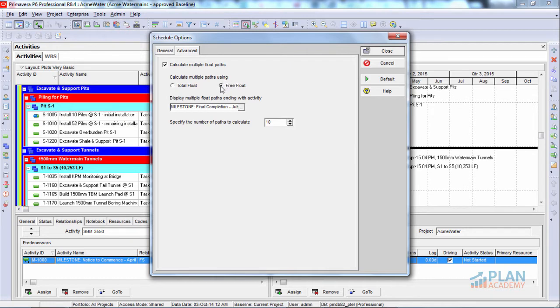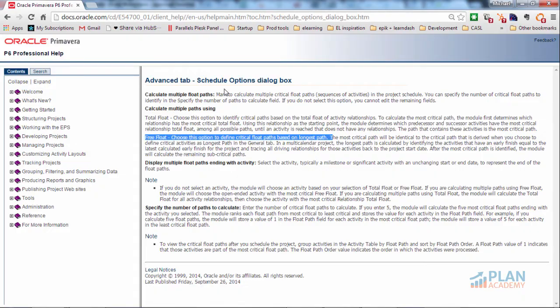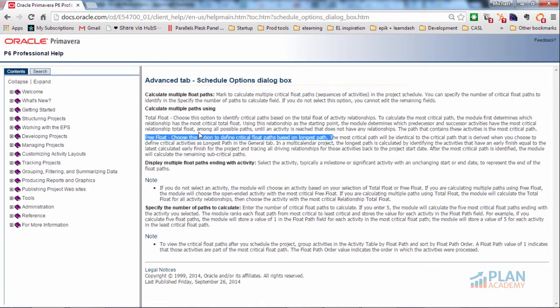Now, why is it that I choose Free Float? Well, let me show you. If I flip over to the Primavera documentation, you'll see here it says Free Float. Choose this option to define critical float paths based on longest path. And that's what we're after in this case. We're going to use the Free Float option here.